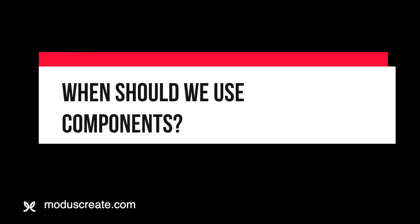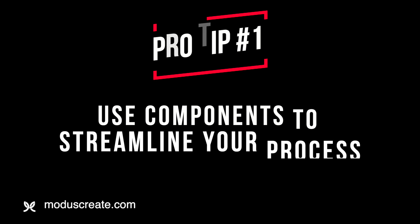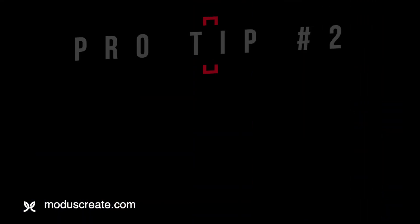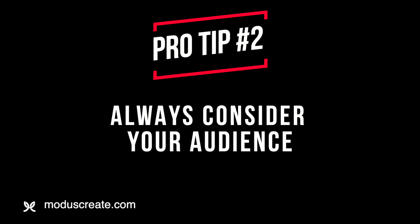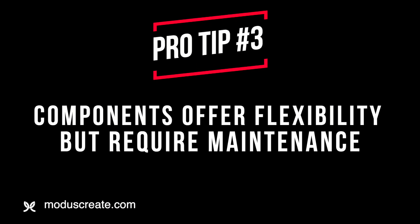Probably the most important question to ask about components is when should we use them? Ideally, you're going to use components to help support and streamline your process. You want to use these components most often to signify when an issue requires different people or different skills, maybe different tools or technologies to complete that particular issue. When building these values, consider that while they may make sense to you, you may not be the person creating the issues, so make sure they make sense to those people who will be creating issues in your project.